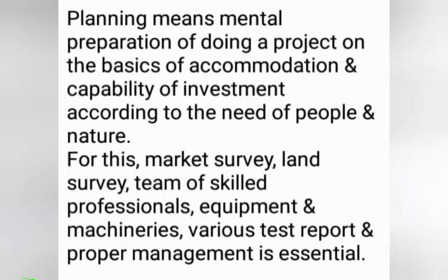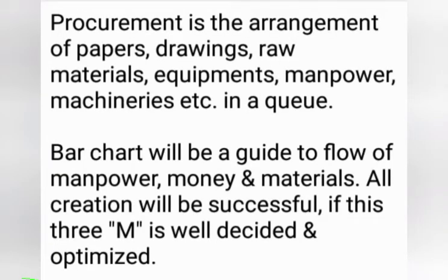A minimum of 1 or 2 days of thorough meeting is to be called for the clearance of all askings, to make a good relationship and to make the bar chart of the work. Procurement is not a one-time job but should be followed by the bar chart.